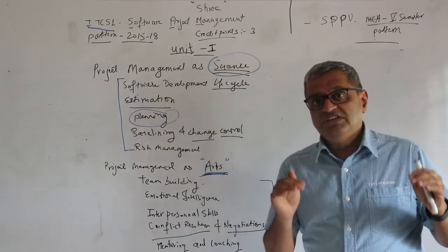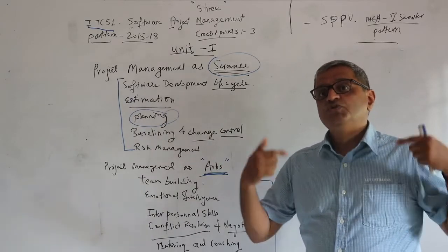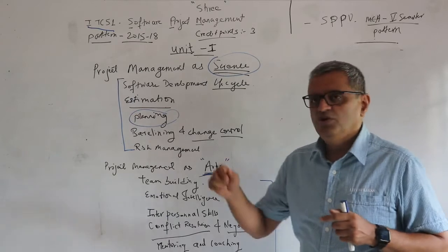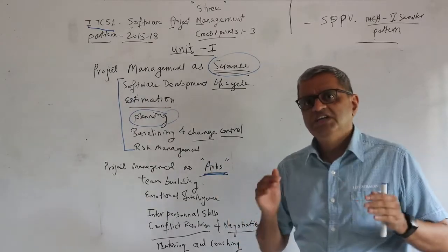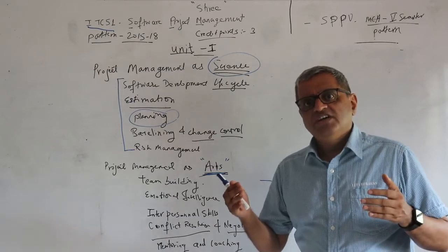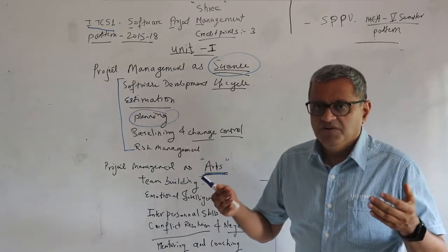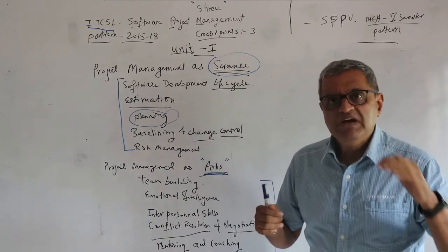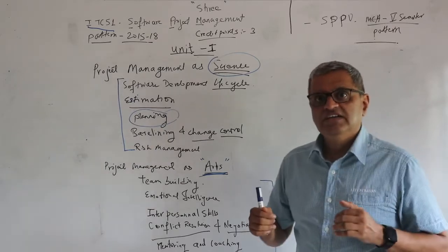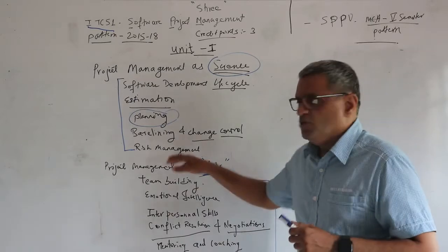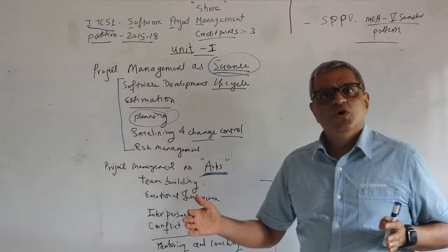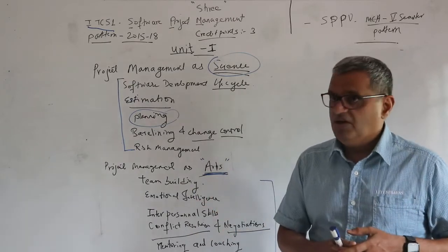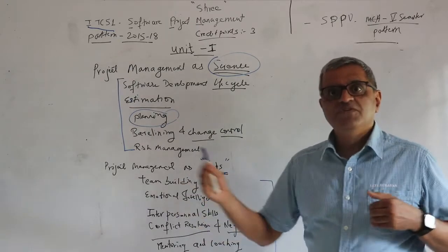Each and every risk which gets identified needs to be managed, which means you have to record the risk, identify the risk, and put a mitigation plan in place. So what's a mitigation plan? A mitigation plan is nothing but the efforts, or the actions you are going to take in order to minimize that risk or neutralize that risk whenever it occurs. So again, it's the risk register which you are going to maintain. It's a record keeping activity, and accordingly you go on tracking and progressing as we go through the development life cycle.